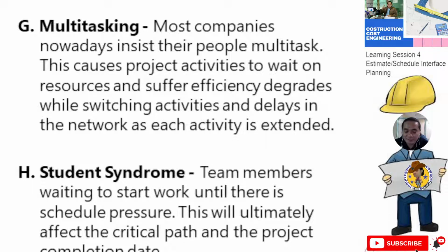This method is good, but there are advantages and disadvantages because all activities have 2 sides. Remember, you have disadvantage and advantage. So it's up to you how to decide and how to make it. But in this case, multitasking will be a hindrance in the completion. Then it's student syndrome. Team members wait to start work until there is schedule pressure. This will ultimately affect the critical path and the project completion date.